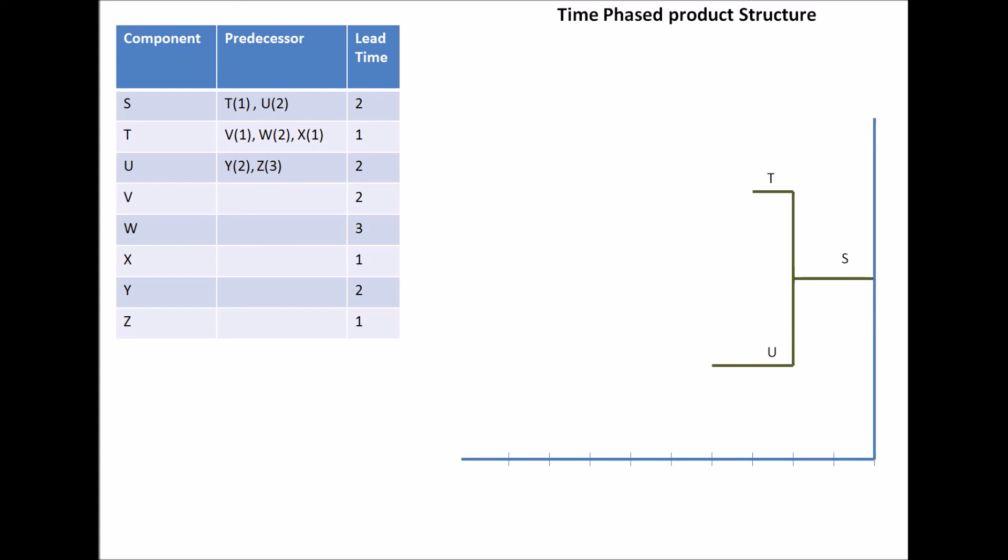Now, T can be divided into its components, V, W, and X. And it's going to look like that. Since W has a lead time of three, it's going to be significantly longer than X, as you can see here. And similarly, Y and Z are the components of U, and their lengths represent the lead time.